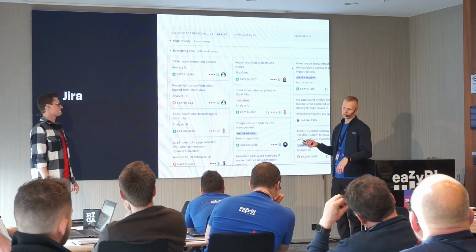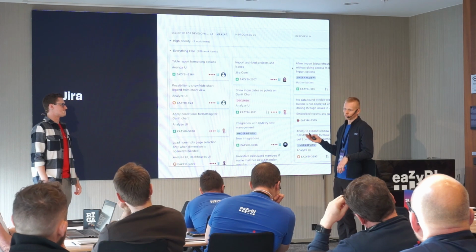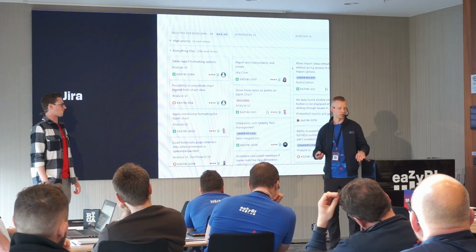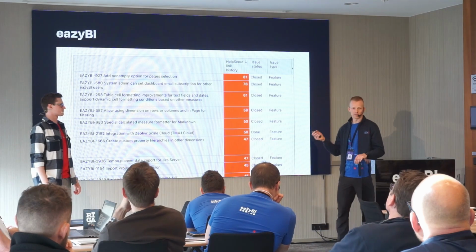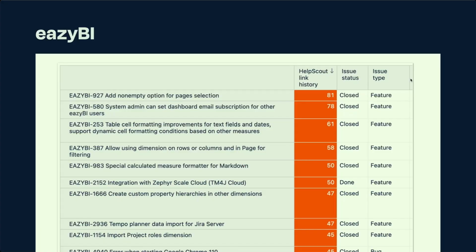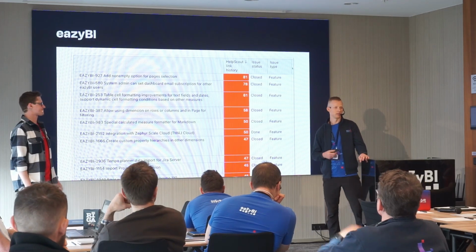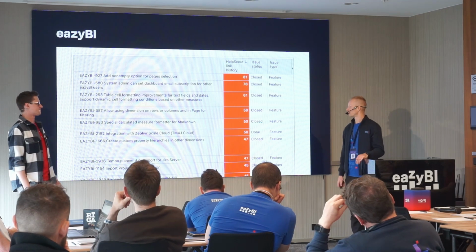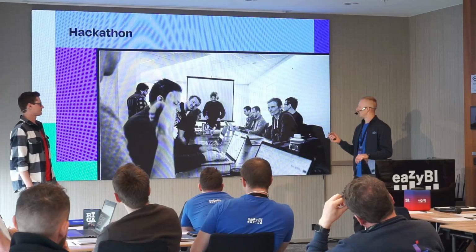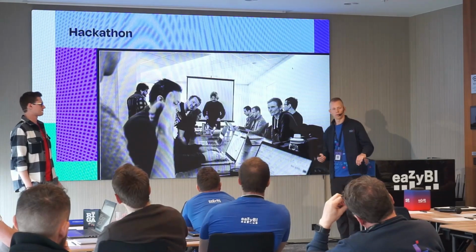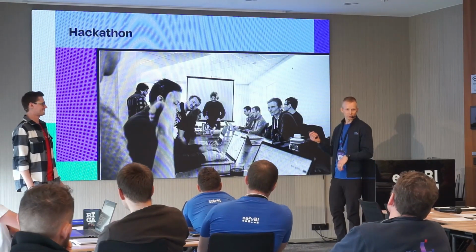The bugs and the security issues go here by default, after some reviewing, of course. But the features are collected like we collect votes. For each unique email, we add to the feature and count the votes, and then see which feature is more requested, and then decide which to pick next and add to this list. And of course, there are sometimes ways to get some cool thing to do in this list.